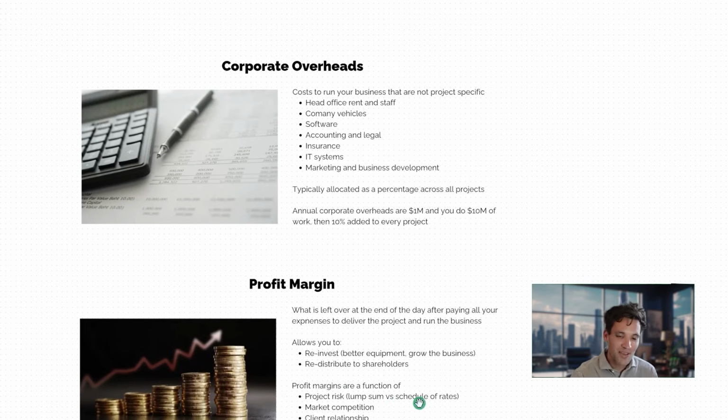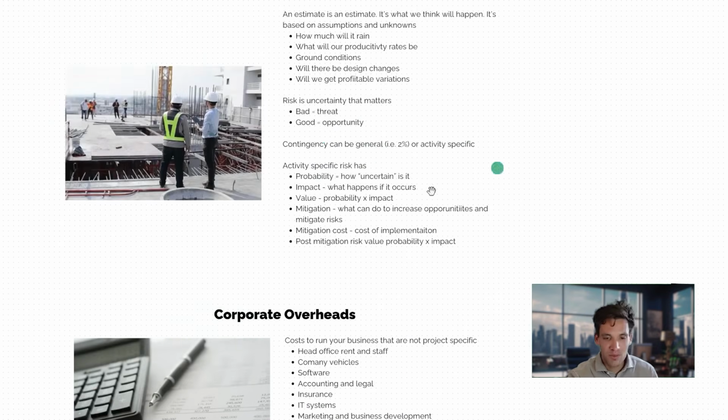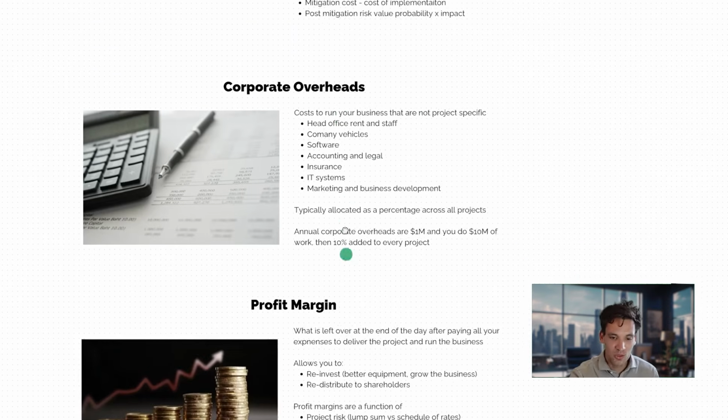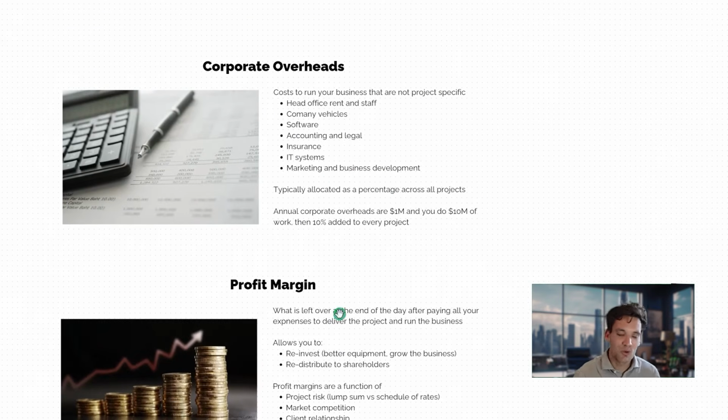So generally, if we're doing a riskier project, and that's when I was mentioning before about how you include contingency, the general approach is the more risk you're taking on as a contractor, you should be rewarded with a higher profit margin. If you're doing a cost reimbursable project where you're taking on zero risk, you're probably happy to do it for a lower profit margin. If you're taking on some huge EPC challenging project where there's a real risk of things going wrong, you probably want to be compensated with a higher profit margin.